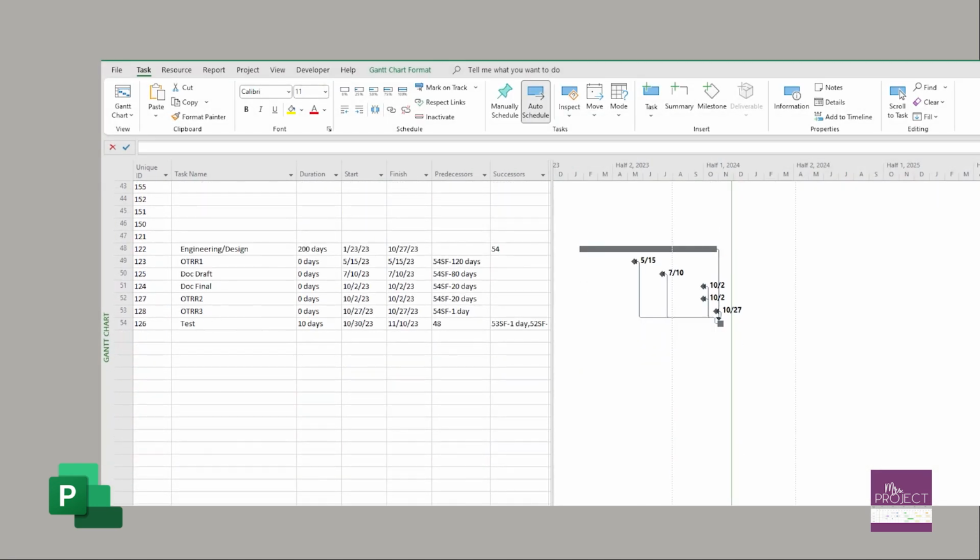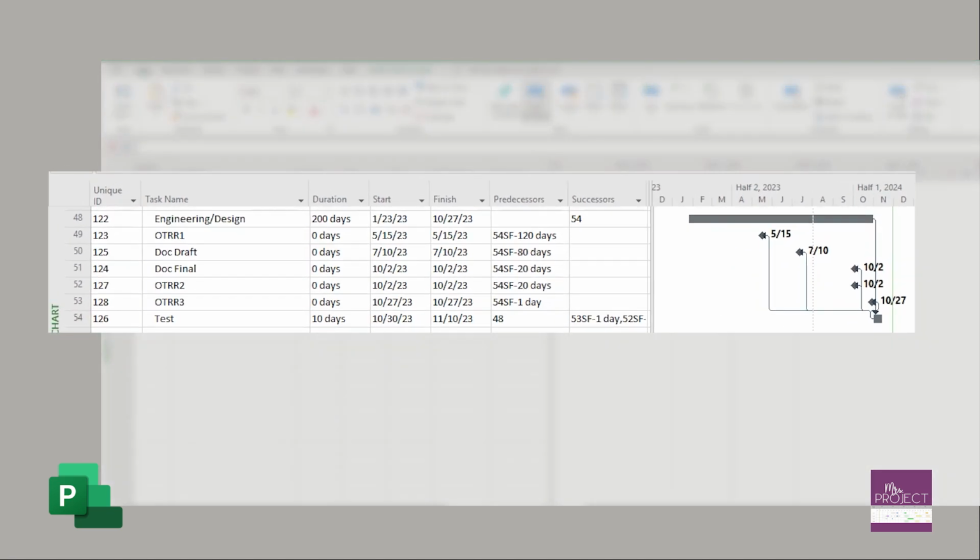Another example of where I used leads was when you're doing testing. There's going to be certain reviews that have to be done so many days prior to the test. Now they have it figured out where it's so many days, like 1 day before the test, 30 days before the test, 2 months before the test, 180 days before the test. There are certain checkpoints and reviews before a test.